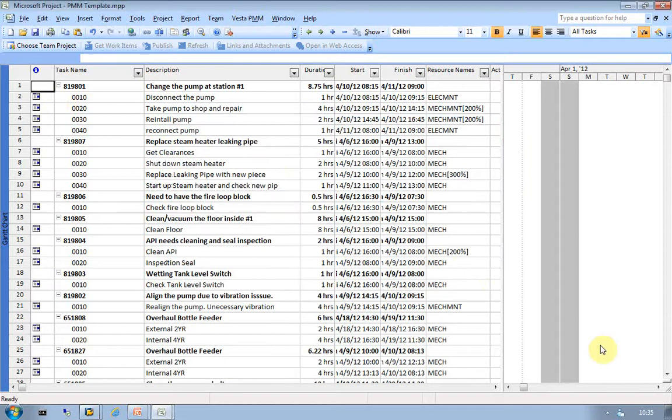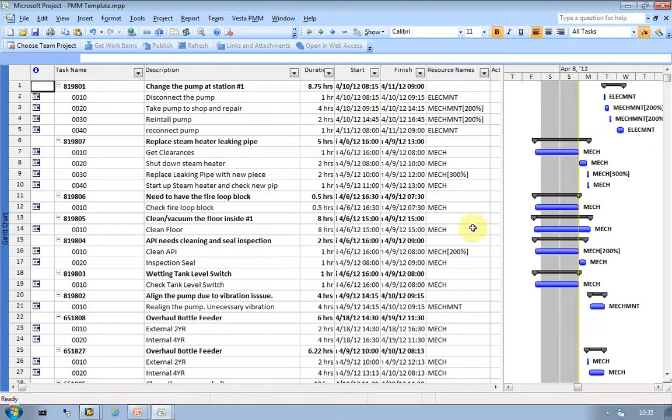In MS Project itself, what you see is that all the work order information came over as tasks and summary tasks. The work order header shows up as a summary task. Each operation shows up as an individual task. The description of the work order header is showing up as a summary task description. The descriptions of the operations, or the short text of the operations, show up in the description of the task itself.